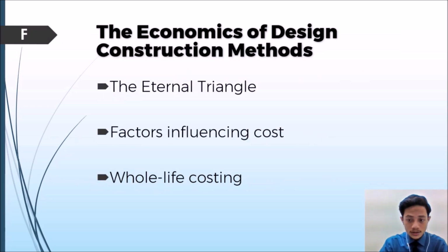Now, one of the concepts that is explained under this topic is the whole life costing concept. As we all know, as quantity surveyors, we should not just consider the initial cost of the construction, but also consider the whole life cost of the building. And if the quantity surveyor understands this concept, it will help the quantity surveyor acquire a far-sighted view in making decisions relating to the cost of the building.